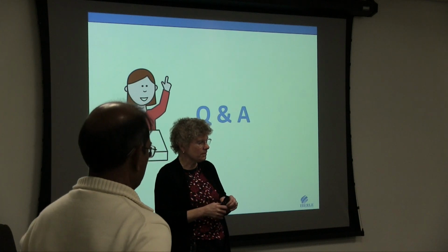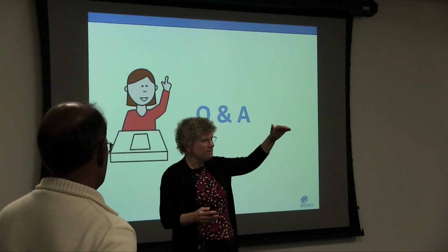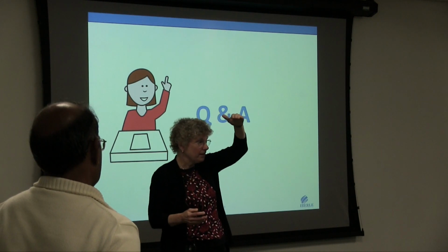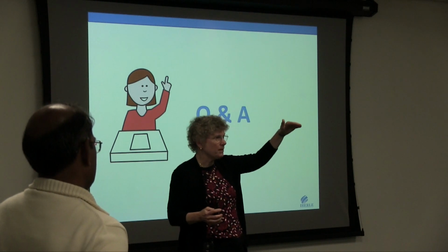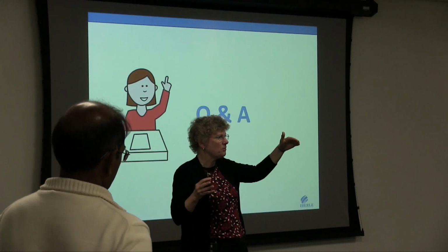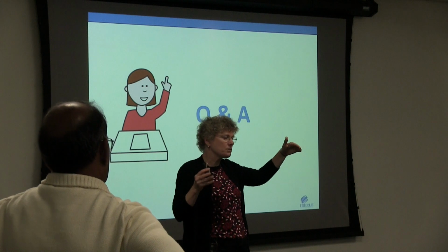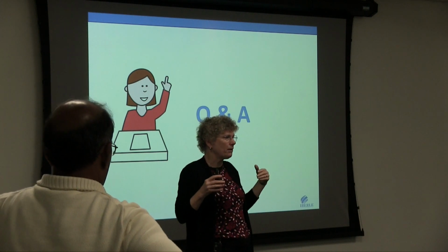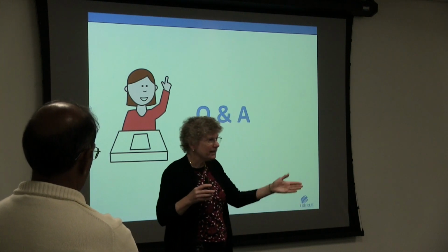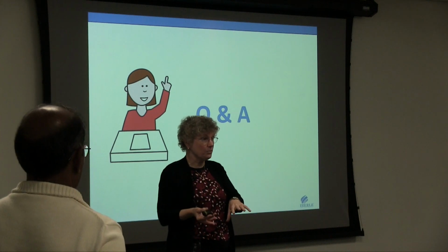So this is like a chart that says, for this type of problem, here's an example of a low severity, here's an example of a medium severity, here's an example of a high severity. This sounds really easy until you sit down and do one. And I found with groups that when we insisted that they sit down and do one with their product owner, marketing folks, it ended up having some very helpful conversations about what would be truly severe and what would be, yeah, not so bad. And that would then drive some of both the design and testing strategy.